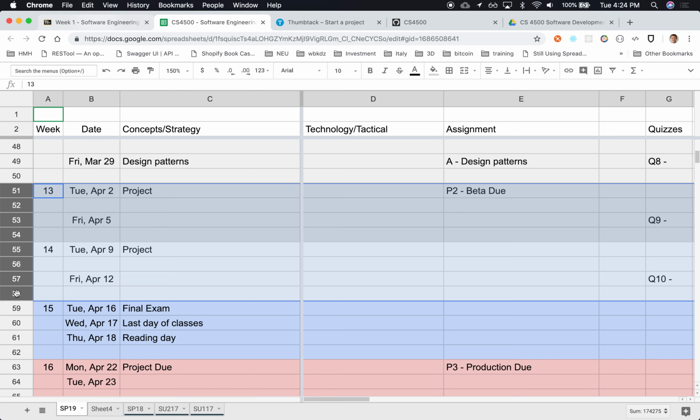But it's a debt that sometime you're going to have to pay, right? And the longer you wait, the bigger that debt gets, right? With interest, right? So at some point you need to have a sprint or two of just paying down that technical debt, right? That instead of an array, it should have been a linked list, right? Instead of some denormalized data model, it should have been a much more normalized data model or something like that, right? And so you have to plan ahead and say, hey, I need one sprint where I'm going to deal with all this technical debt, right?